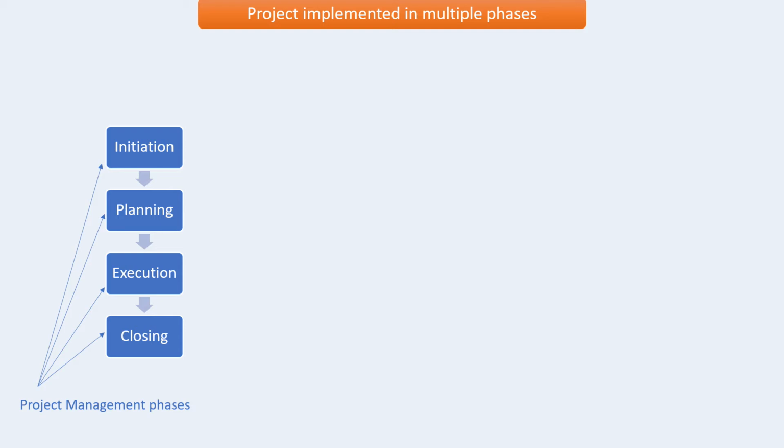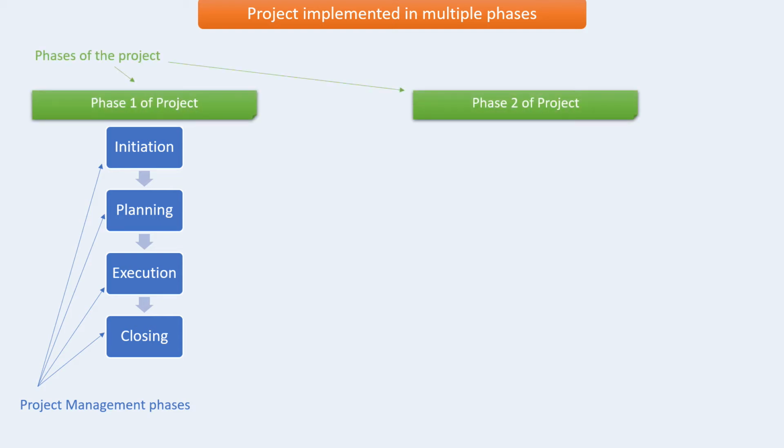Now you know those. But what we can also call phase is future implementation of the project, something else to be implemented. For instance, you could have phase one, we build a simple website to showcase our product. And phase two, we will allow for the client to purchase those products online. So phase one, we want the client to be able to see our products, only to see the product and maybe the price, but they cannot purchase it yet. And this is actually the example I will have in the example that comes next.